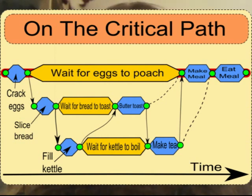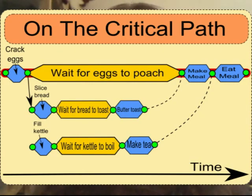What if you are concerned about being late for work? Reducing the toasting time would be pointless, since toasting is not on the critical path. What about calling for your significant other? Two pairs of hands allow some tasks to be parallelised — in project management jargon, creating greater parallelism is known as fast-tracking. Slicing the bread and boiling the kettle simultaneously makes the result look like this. However, this intervention makes no difference to the overall project duration, so you should probably let your other half rest in bed.